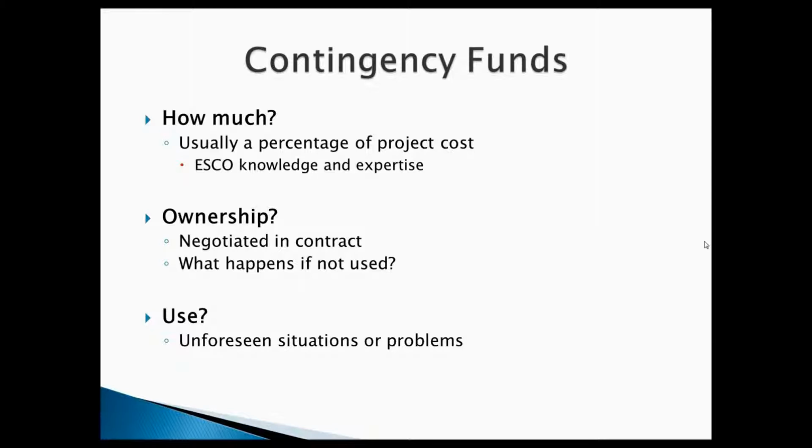No one foresaw that. So contingency funds were used to replace that pad. Now there's an example not only of contingency fund use, but unforeseen problems or a schedule change, because we couldn't go forward with replacing the chiller until the pad was replaced. So that was certainly justifiable for using the contingency funds.